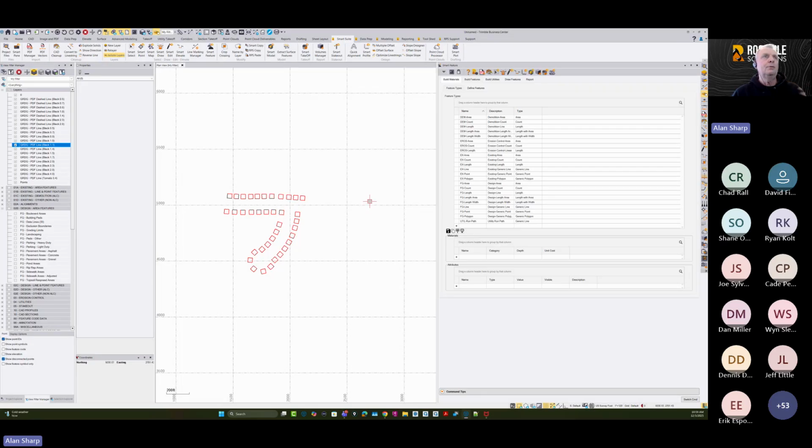So we built in formulaic information into length width features that allow you to define the length width feature, which is by picking a line, which could be the center line or the edge of a pavement line, and defining a width or defining 2 widths, 2 offsets. You can build a parallel lane feature, and then within that lane feature, you can put in the quantities of the materials, and then on top of the materials, you can put in the quantities of rebar and things like tie bars and stuff like that as well. I'll show you how to do that in just a minute.